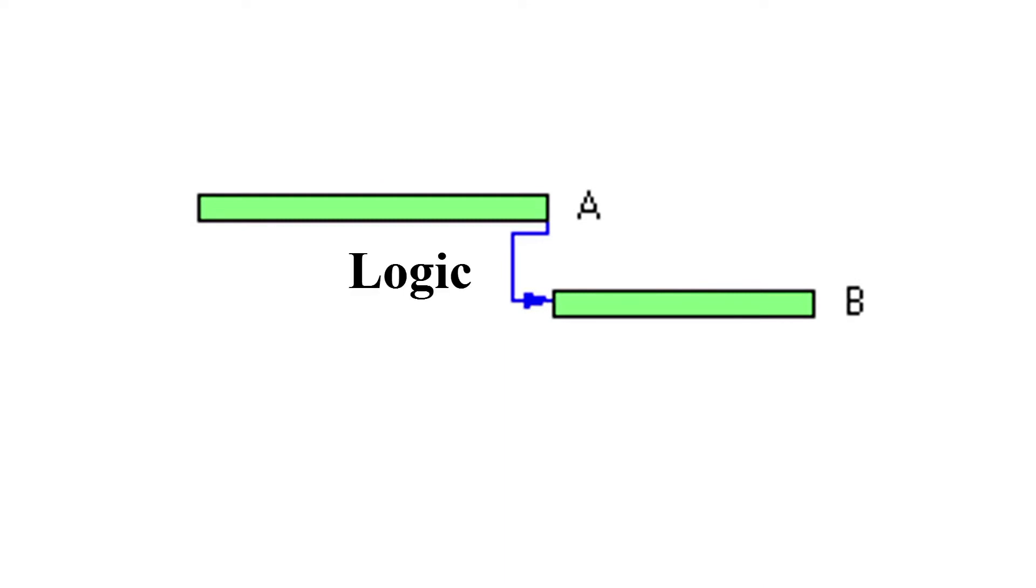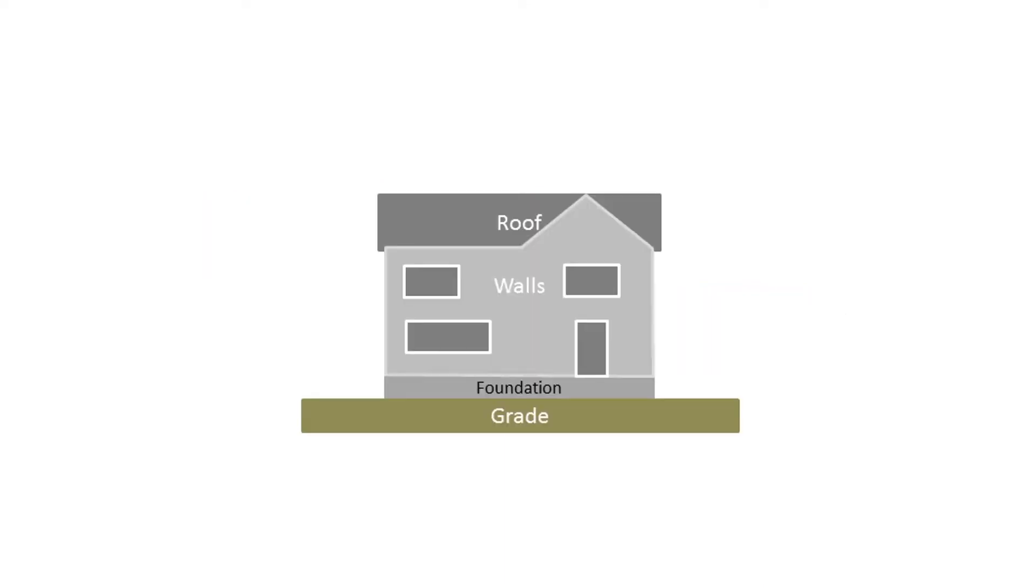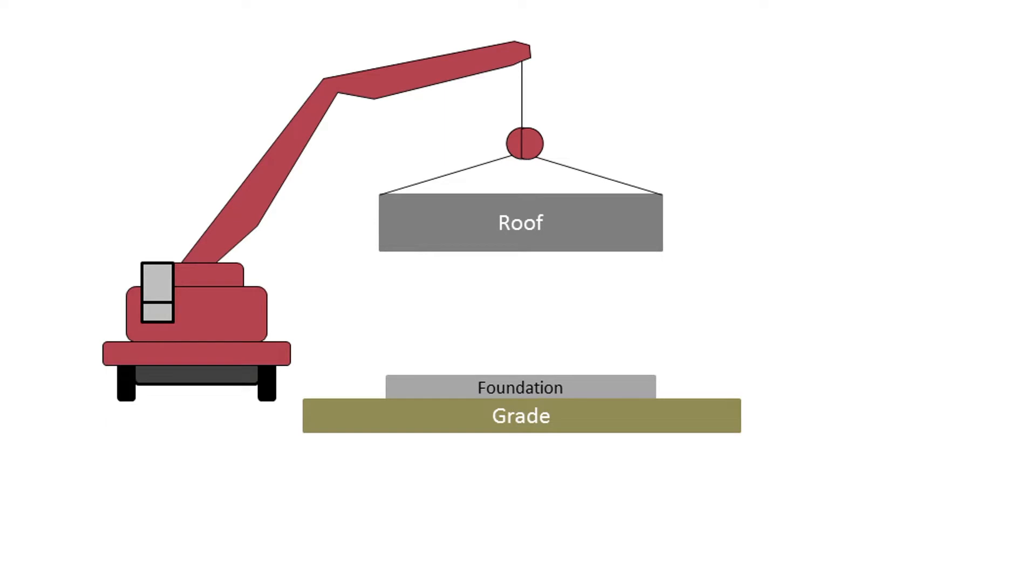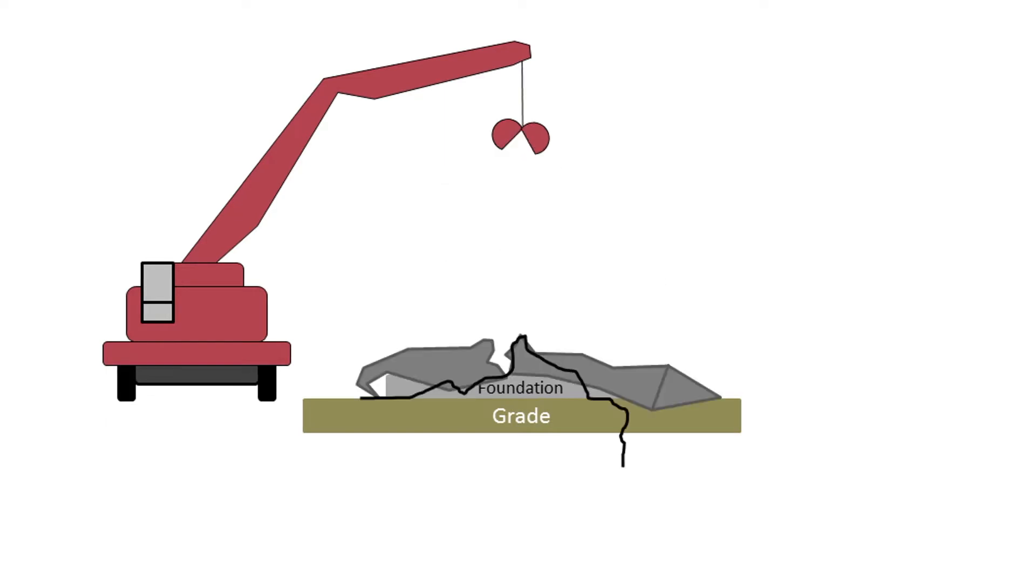For example, when building a house, the roof is dependent on the completion of the walls, and the walls are dependent on the completion of the foundations. It would of course be physically impossible to do it in any other logical sequence, hence the term logic.